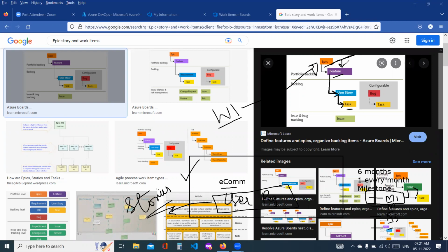Angular.js, they'll ask, how much effort is required? Based upon this, they will tell us that for releasing this user registration as a feature, we need 1 week for developing and 1 week for testing. So they will take it as 2 weeks in total, and they will tell the client, we need 2 weeks for us to release this feature.